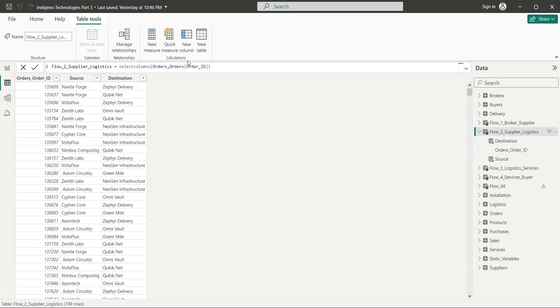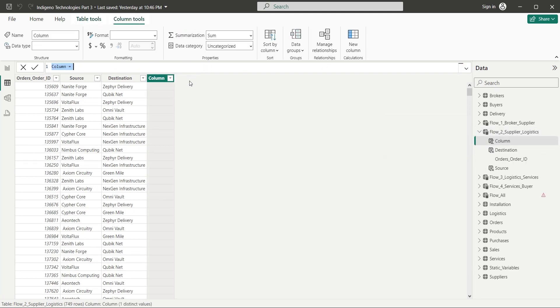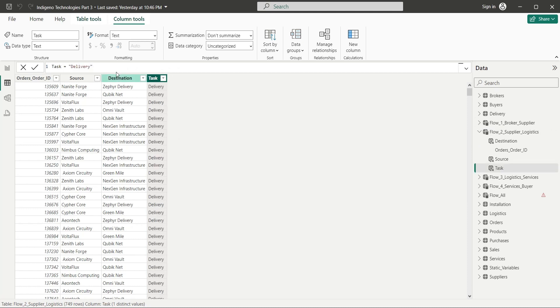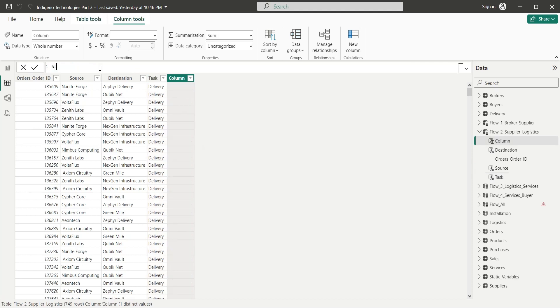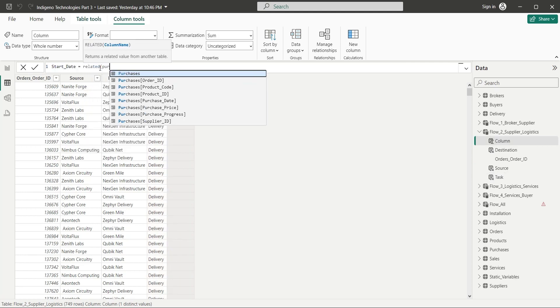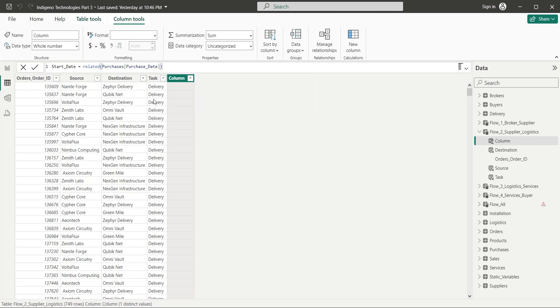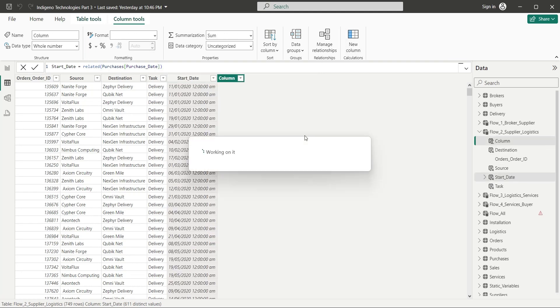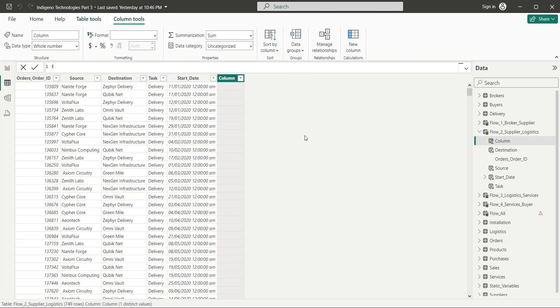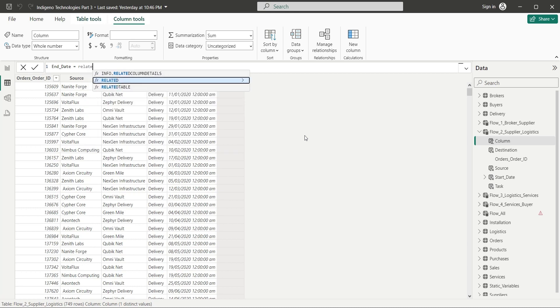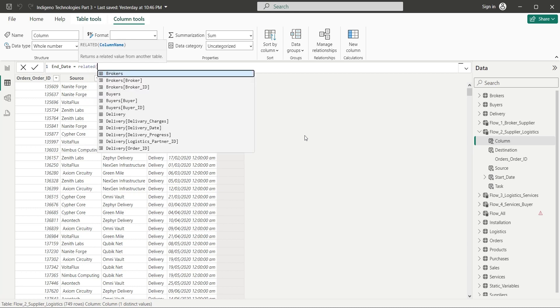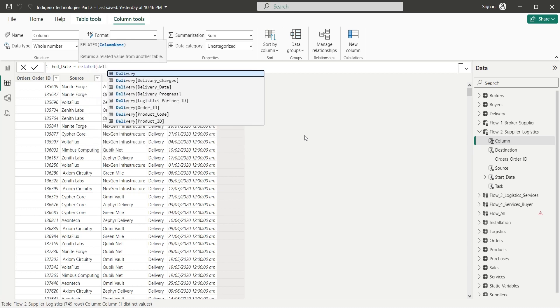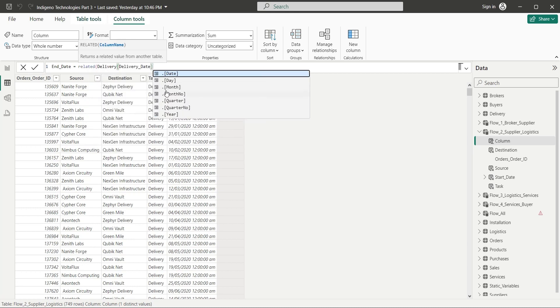Let's add a task column with delivery as static string, which represents task in this table. The delivery task starts with the end of previous task, which is purchase. So the start date is purchase date from purchases table. And the end date of delivery task is the date of product delivery from the delivery table. Again, we will use the related function.